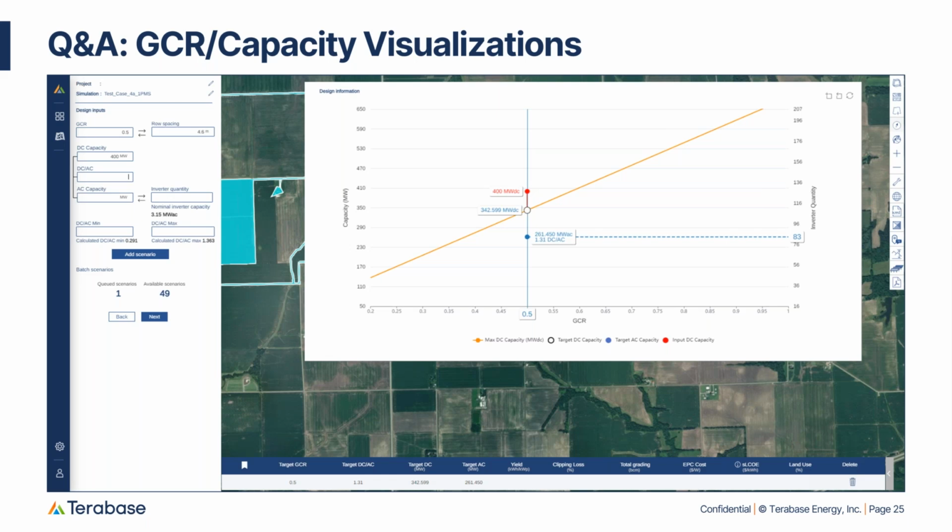They have a state-specific database for different kinds of laborers, and then we assign that cost to that amount of labor and figure out how much it would cost to do that total part of the construction. So we do that a bunch of different times for different equipment and different labors, and that's how we get the EPC cost.